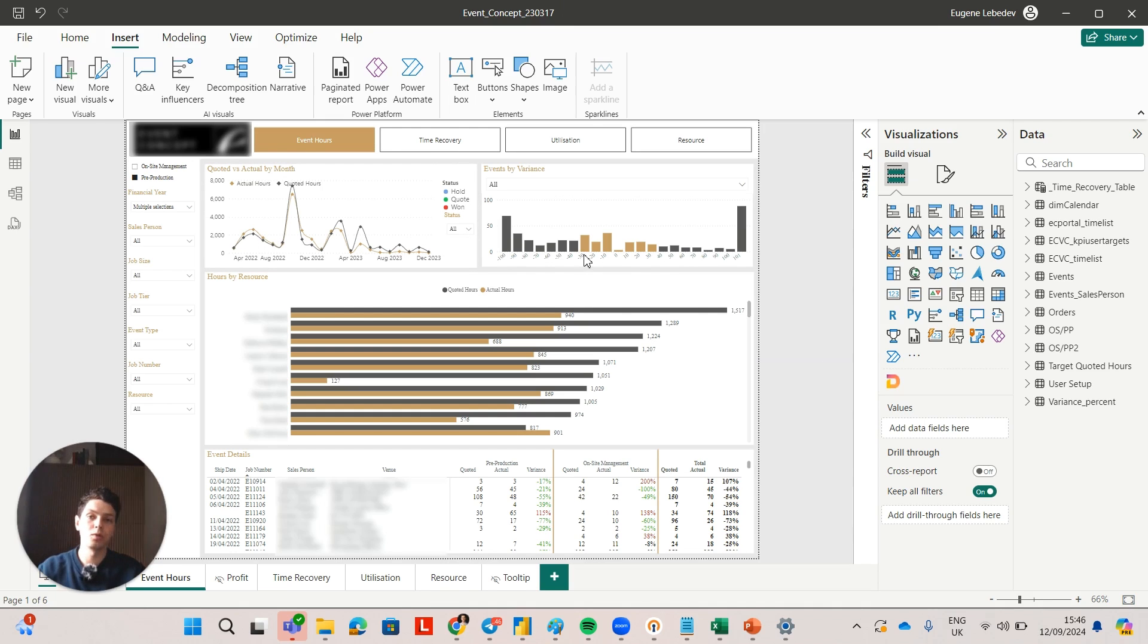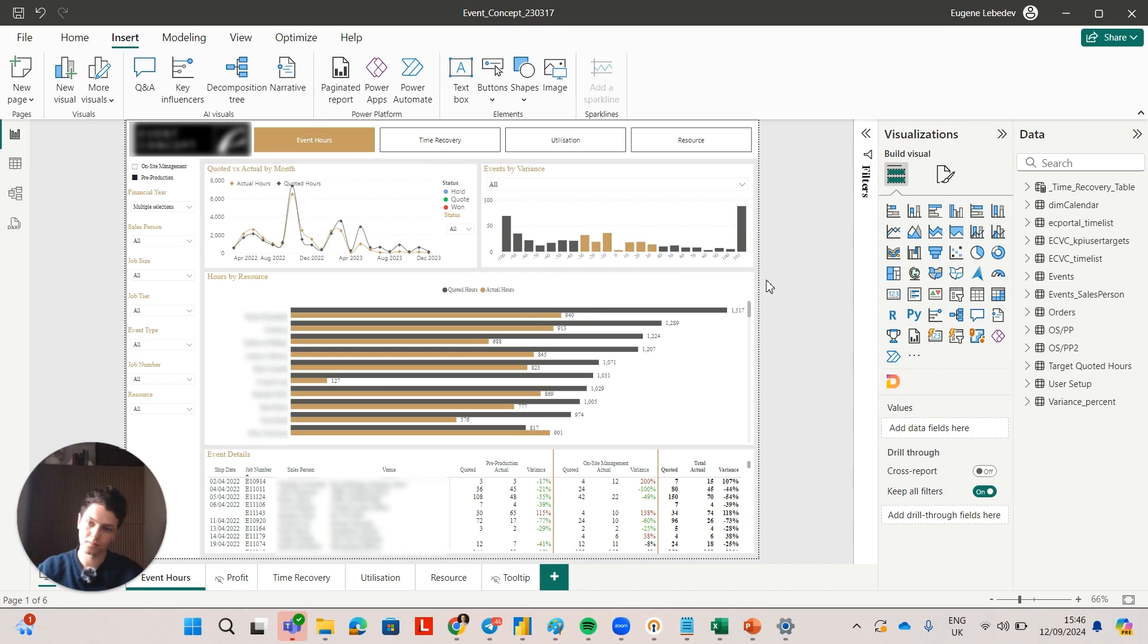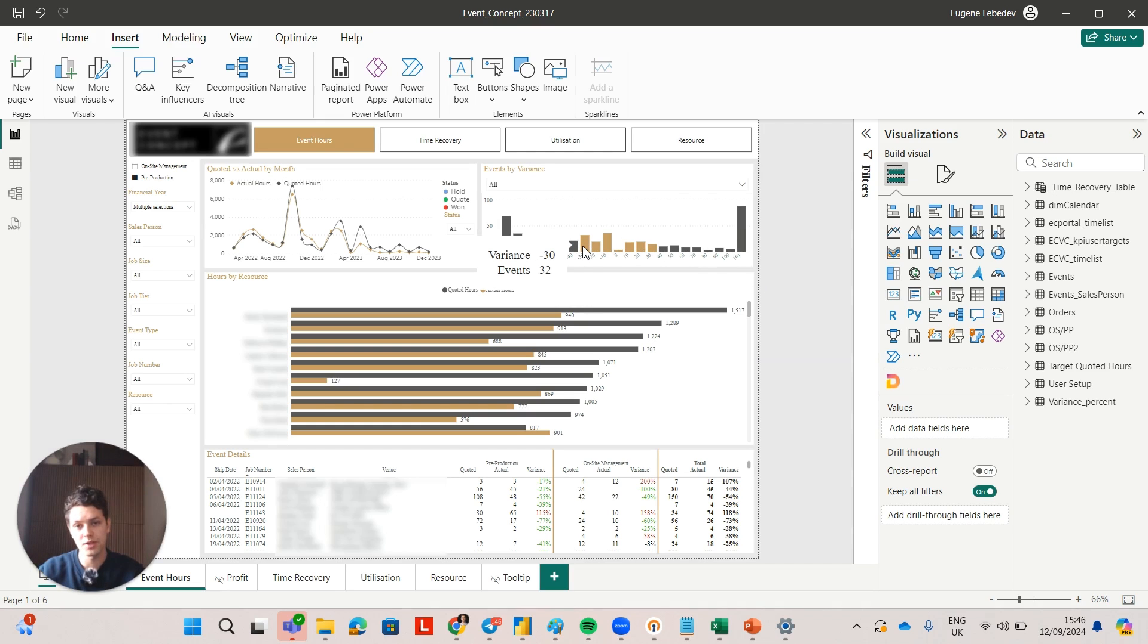They also wanted to see number of events by variance. So variance means quoted hours minus actual hours. They wanted their events to mostly be in this zone where it's plus or minus 30 percent.